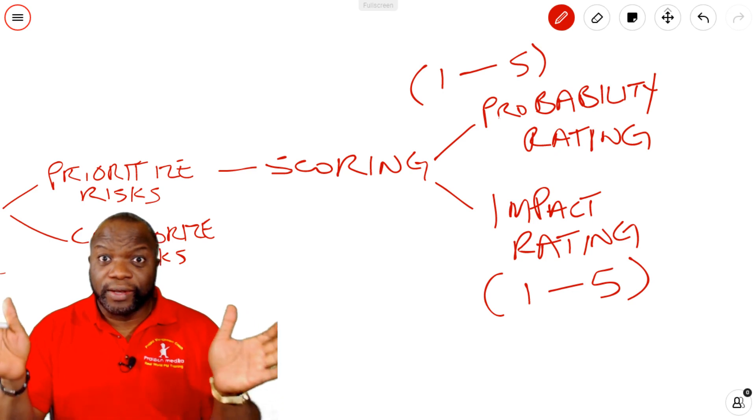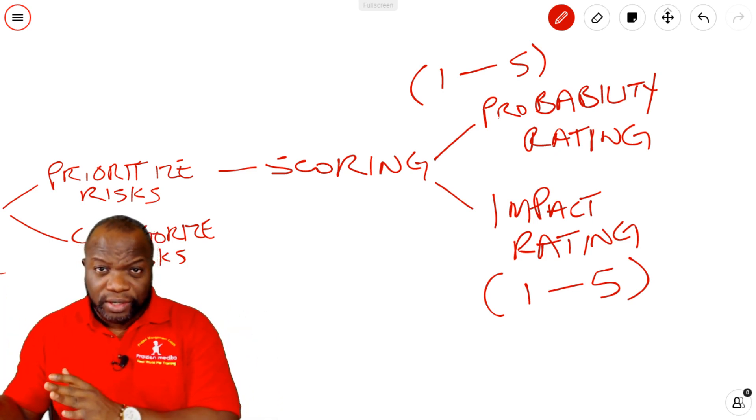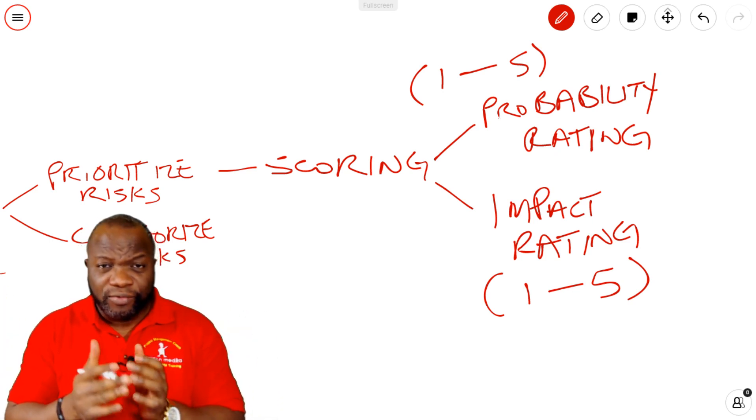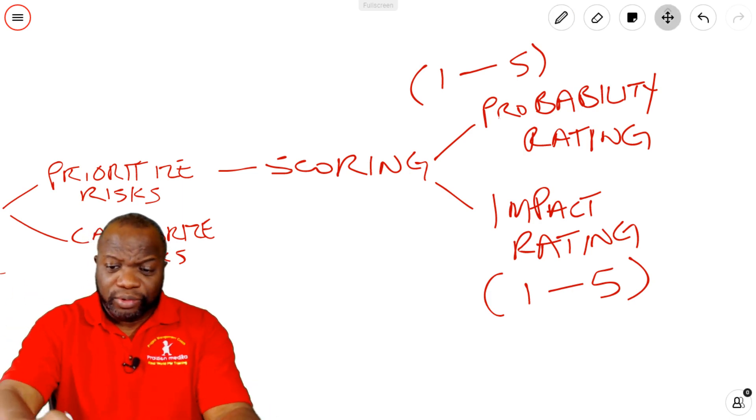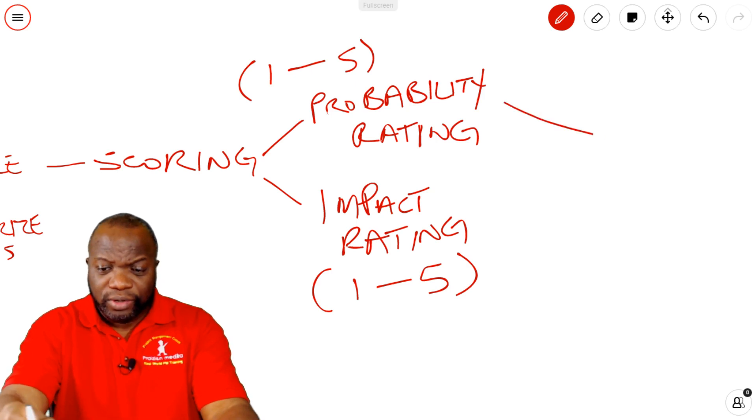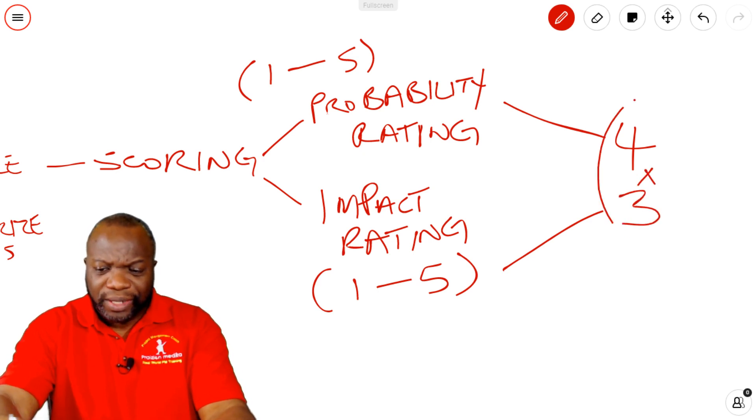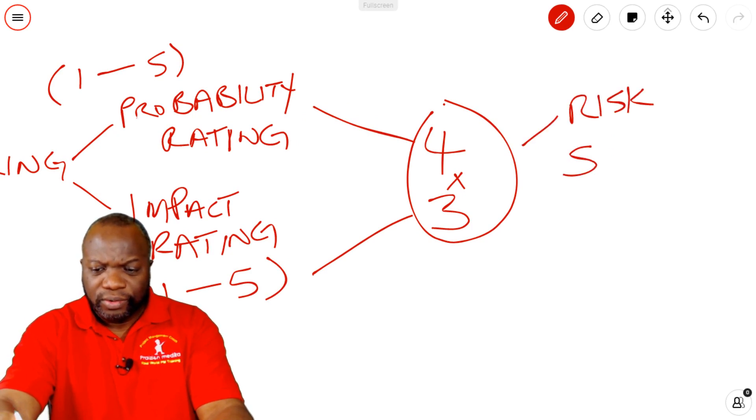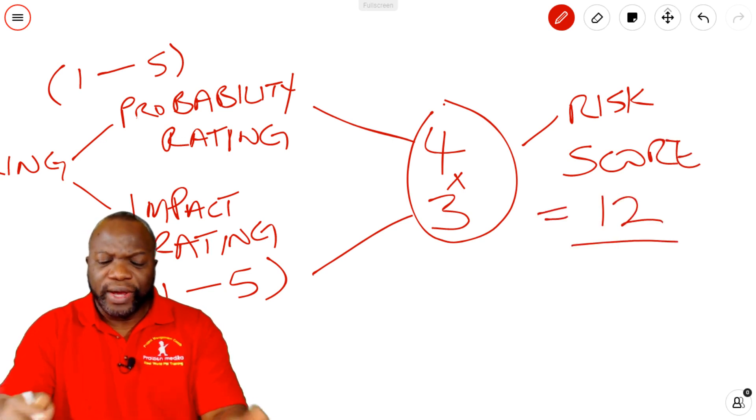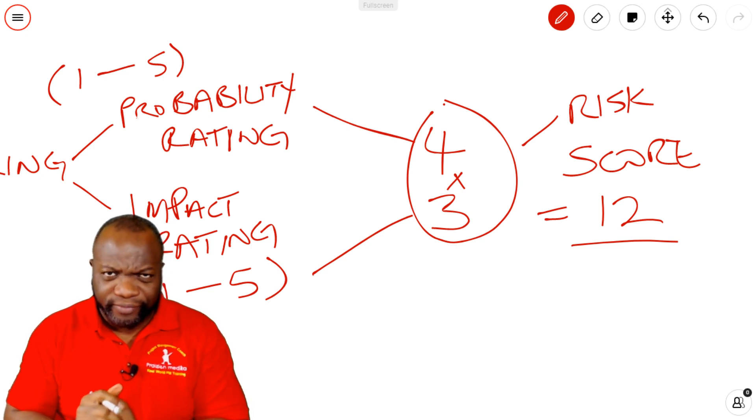These ratings mean nothing on other projects. So if on my project, I say a risk is a four probability, for example, let's take a look at that example. Four probability. And let's say on an impact, I say it's a three. Okay, we're going to multiply these. And this is going to give us the risk score. And the risk score is 12.